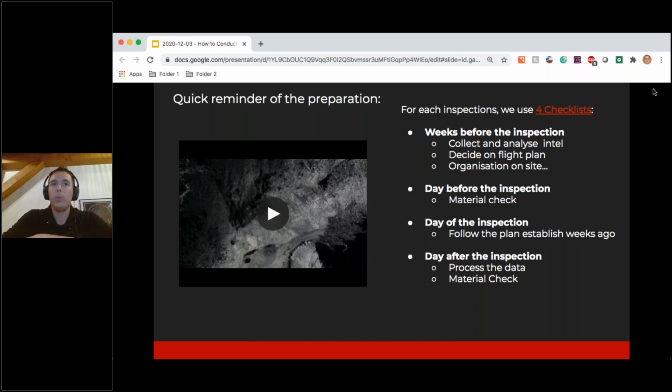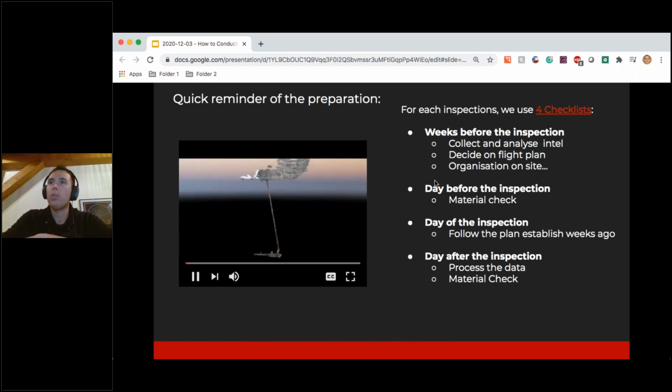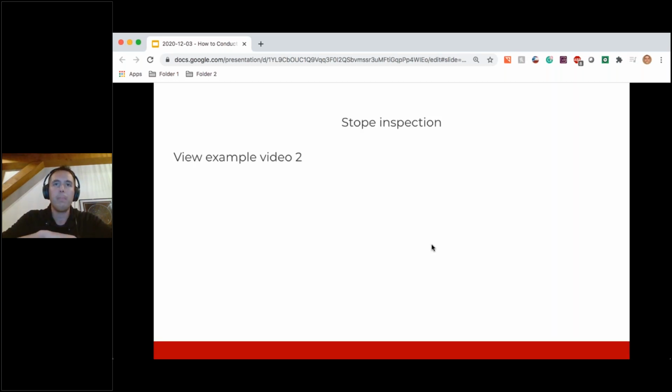Yeah, no problem. But what I wanted to show there is that at the bottom of the stope, when we tried to fly out, it was so windy that the stabilization had trouble because I could not fight the wind enough. So I switched to the mode where it's not stabilized, and I had to switch even to sports mode to be able to fight the wind and fly out of the stope. So again, we knew that there would be some wind, but we would never imagine that we would have more than 30 kilometers per hour of wind in an indoor facility. But as we are running out of time, you can take over, Zach. It's what I wanted to say, more or less.